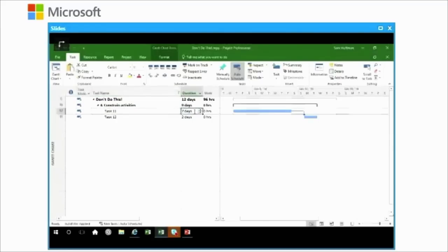It works in the other direction as well. If I go back to the 2-day duration, it'll bring the task right back. So this idea of sequencing and linking activities just treats this timeline like an accordion. It can expand or it can contract based on decisions that you made about the sequencing type. There are more than just the one we're seeing here. There are actually four types of sequences and the ability to overlap and create lags or gaps in Microsoft Project.